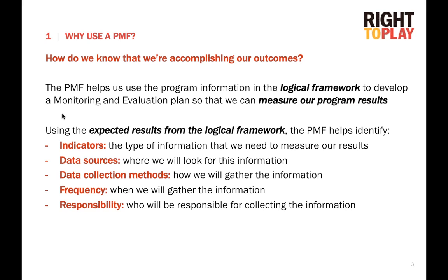The PMF is built on the expected results from the log frame, but it goes further than the log frame does, and it helps us identify the indicators, which is the type of information that we need to measure our results, the data sources, which is where we're going to look for this information, the data collection methods, which is how we're going to gather the information, the frequency, which is when we will gather the information, and the responsibility.